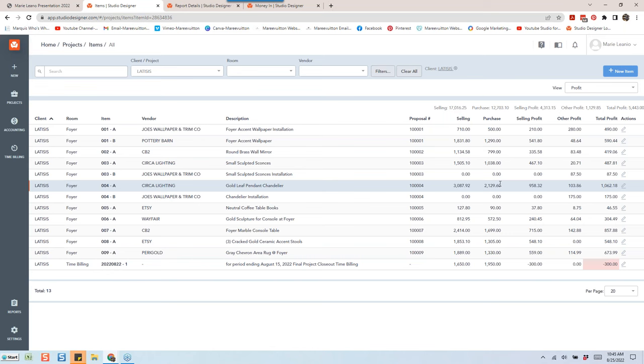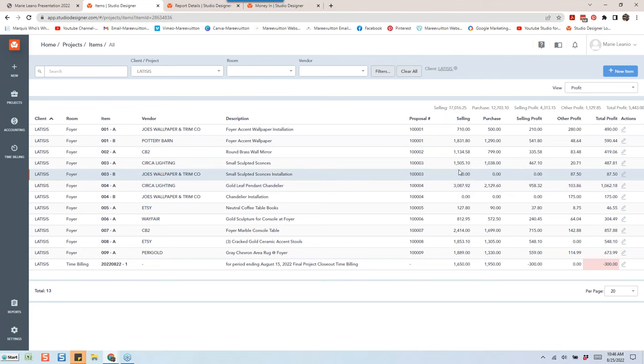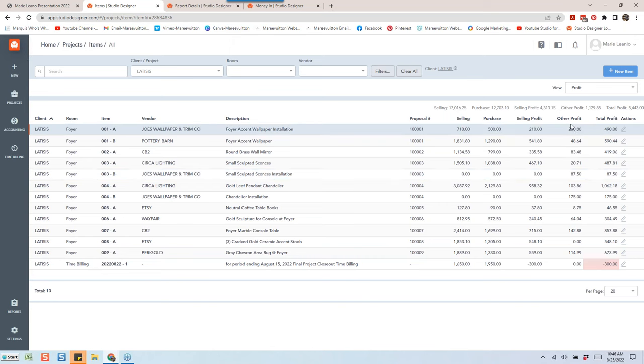I think we have time for a few more. Yep, absolutely. So we have a question from Michelle. What if you do not have funds available left and there are little outstanding amounts? Okay, I would try to eat up any over-unders, for freight, but when whatever little balance would still be available is gone, that means we've used up everything. I then send it to the client, still through Studio, and I say, hey, we've closed out the project. I make sure that I let them know.